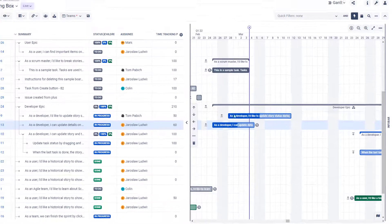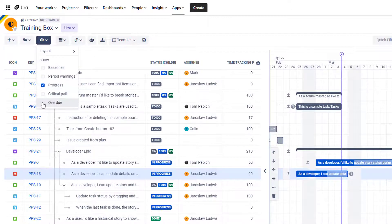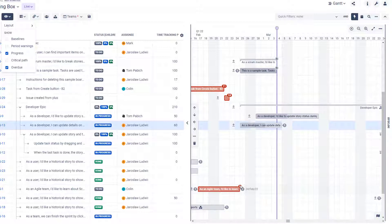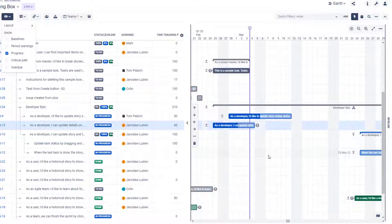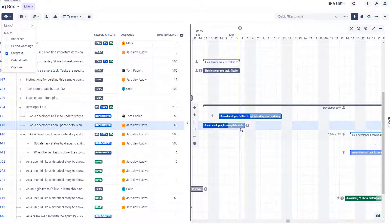If you just want to see tasks that are delayed, you could turn on another setting called overdue. When you turn it on, you will see that some tasks are marked as being late by 10 days, 11 days, 8 days. However, this definition is sometimes not perfect because tasks are marked as delayed simply because they should have been finished but are not yet. These two blue tasks here are not supposed to be finished yet — we can see the today marker, this vertical line showing where we are right now.